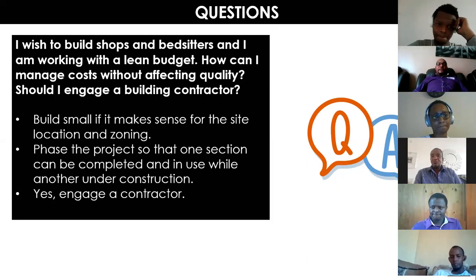So it helps, because at times you'd find that people engage in projects which are too big, and then they get stuck in the middle, then they have sunk their capital, and they cannot get any benefit from that capital that they've put in there. So I think it's important that if you can't build small, because the way it looks and the kind of project you're talking about, bedsitters and shops, this is not a small project. So the only way out I'm seeing is if you're able to phase the project.